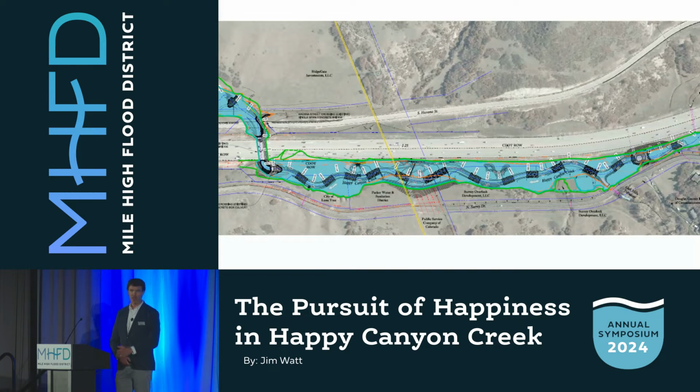So this slide shows the overall scale of the project, some of the project improvements, as well as the 100-year floodplain. The design team put a lot of care and attention to detail into the placement of drop structures and the alignment of the low flow channel throughout the project, really trying to preserve as much of the vegetation as we possibly could, which in the long run ended up saving us a lot of money in the construction phase. So the attention to detail during design really matters.